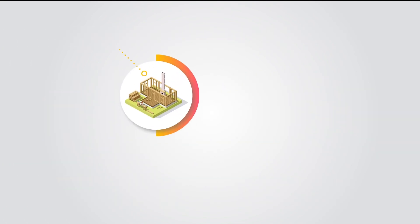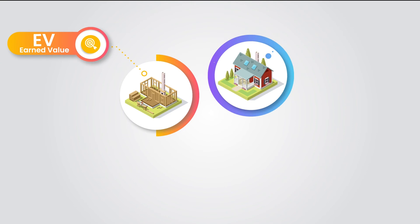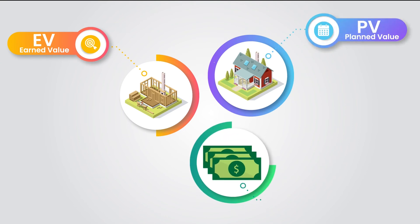If you accomplished less work than planned, meaning EV is less than PV, you're behind schedule. And if you spent more than you earned, meaning AC is greater than EV, you're overrunning the budget.